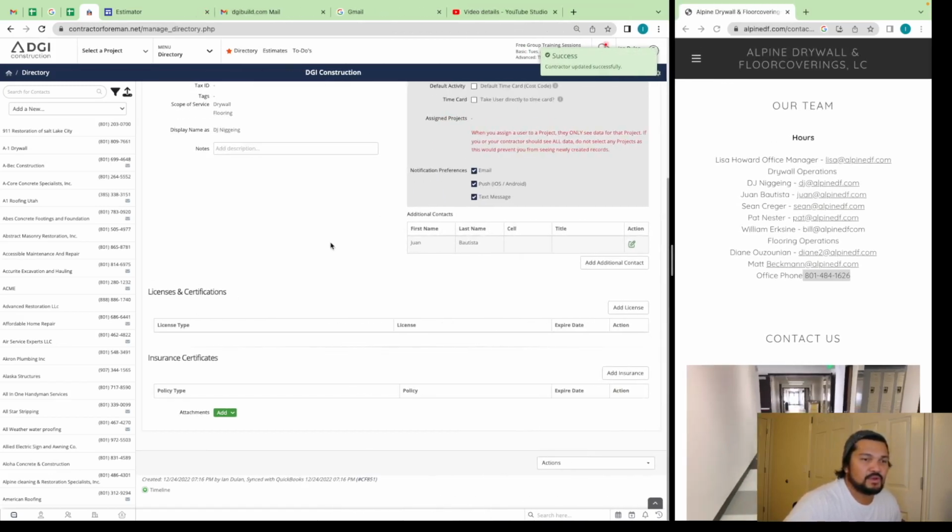Let's say we do have them bid, they send us a bid, we accept their bid, we send them a subcontract. When they approve the subcontract, then we start gathering their W-9, their contractor's license, and their general liability. And in the subcontract agreement, it'll have all the information we'll need, like lists and specifications for this project. And then we'll just have to install it here.